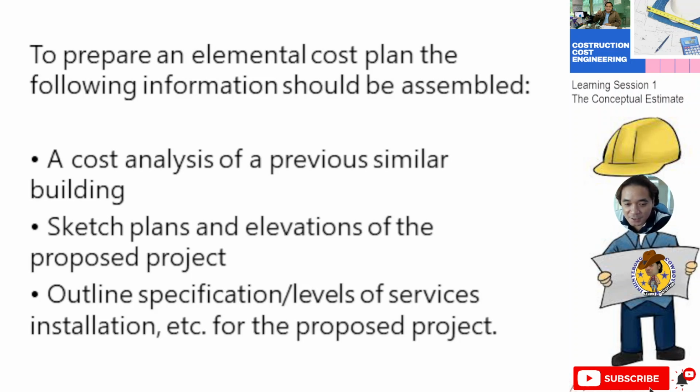you will consider the time. Time is important in estimating because after 5 years, usually the labor cost and material cost increase. So there are things that you need to consider in preparing conceptual estimates, and that is why you need to be careful. Next, sketch plans and elevations of the proposed project. These are the plans. You need to see that one in the estimate.